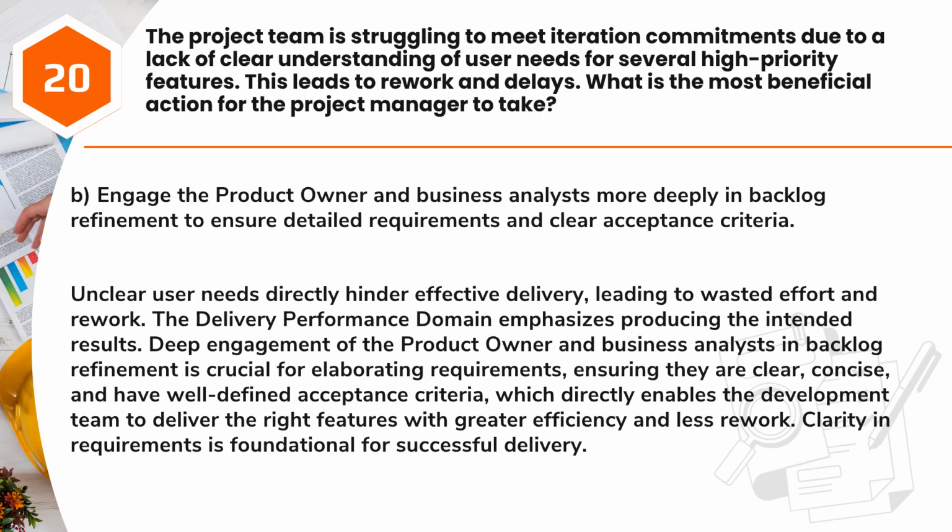Answer: B. Engage the product owner and business analysts more deeply in backlog refinement to ensure detailed requirements and clear acceptance criteria. Unclear user needs directly hinder effective delivery, leading to wasted effort and rework. The delivery performance domain emphasizes producing the intended results.